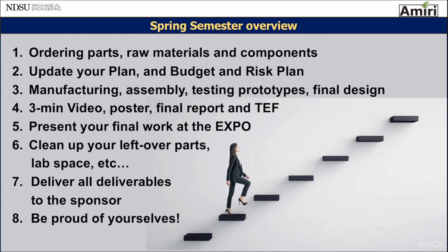I mean, it depends on your project plan and when it's on your project plan, but for most of the teams, it should be already started. Sometimes delivery times on some of the parts on raw material are 4, 6, 8 weeks. So you better get on that sooner.